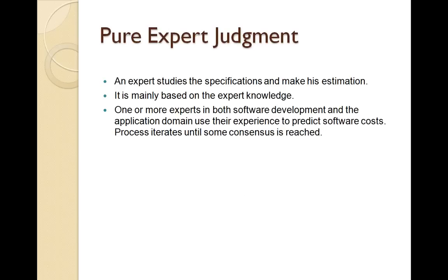The first one is pure expert judgment. In this case, a person who might be a technical lead, a project manager or a subject matter expert would go through the requirements, try to understand the requirement, and come up with his guesstimate. The person will say, okay, I have worked on this particular login module earlier, and based on my experience, the same login module developed for this particular project will take 1 month.